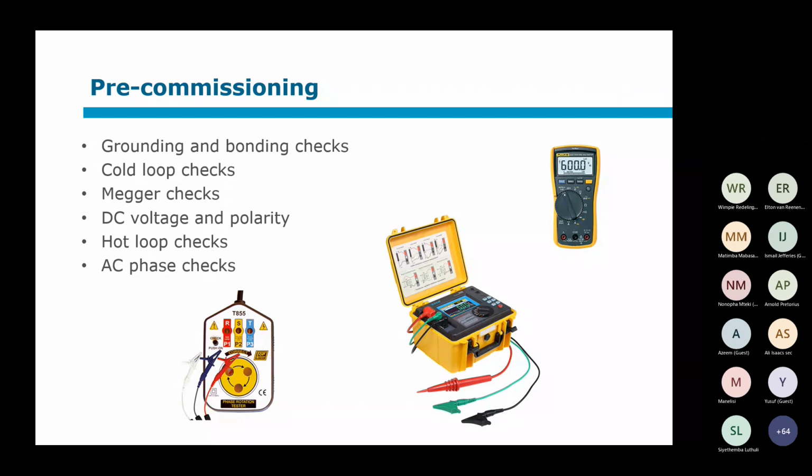Now, whoever built the integration equipment would do the pre-commissioning and issue the test certificates or test reports. During commissioning, it would be advisable for the distributor to have somebody witness the commissioning tests, making sure that it goes through a rigorous process to make sure that there aren't any signals connected incorrectly again. So typically you set up a set of tests, and that depends on what's being commissioned. I don't have a good range for that, but let's talk about commissioning a little bit later. So pre-commissioning, whoever did the construction does the pre-commissioning as well. Issue the test reports and certificates before you can continue to the next stage of commissioning.